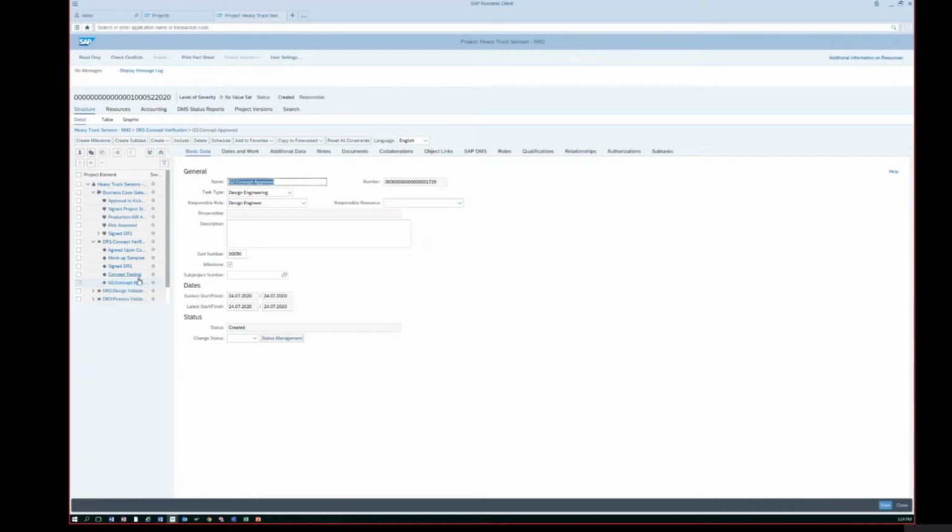analysis. All these project elements, project definition, checklist items, tasks, and phases, have dependency among themselves, a time dependency. For example, you can start the second phase after the first phase is over, etc. Checklist items do not have durations. Tasks are usually assigned to the phases, but depending on your project requirement, you can assign tasks to the project definition.